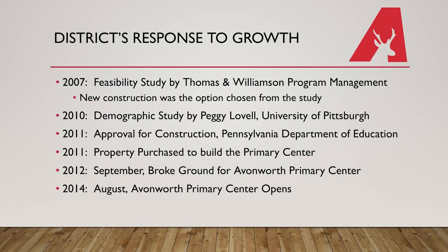Recognizing the district's continued enrollment growth over the last 20-plus years and anticipating continued growth, the school board and administration at the time wisely began to investigate available options for the future. In 2007, Thomas and Williamson was hired to conduct a feasibility study to evaluate the district's current facilities and obtain options for the district to consider. The study identified new construction as the most appropriate and feasible option to address the district's continued growth.